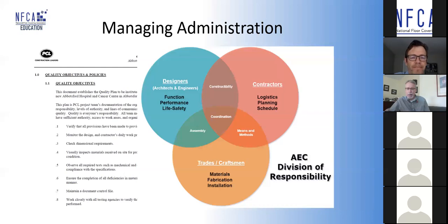Actions change. And even more important these days, I don't know very many larger projects these days that aren't being fast-tracked. So many times now, the floor coverings are being bid on a project 6 months after the concrete's being placed. It's too late to make any of the adjustments if you don't have those pre-construction meetings.